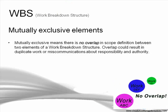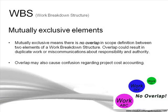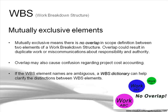Mutually exclusive elements: this rule basically means that there is no overlap in the scope definition between two elements of a work breakdown structure. Overlap could result in duplicate work or miscommunication about responsibility or authority on the project. Overlap also causes confusion regarding project cost accounting. If the WBS element names are ambiguous, you can use a work breakdown structure dictionary to help clarify the distinctions between the work breakdown structure elements.